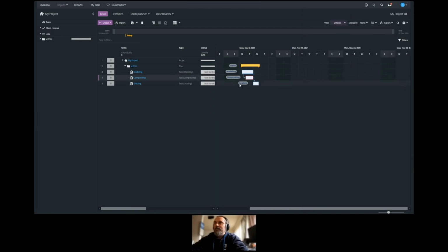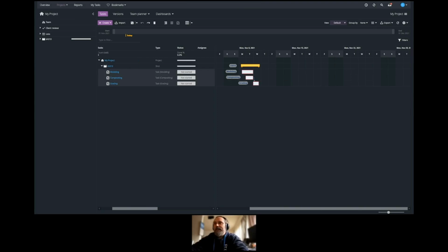And then here we can see the links, which are relationships between different objects in the task spreadsheet view. What we just saw as well is that in the Gantt Scheduler, you can see a little blue line showing that we've created a link between the compositing and grading tasks. If we double click on that line, it's going to open another dialog, which will show us where the link is coming from, going to, and if you have any overlap between them.